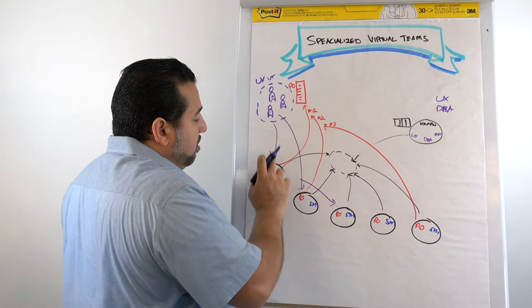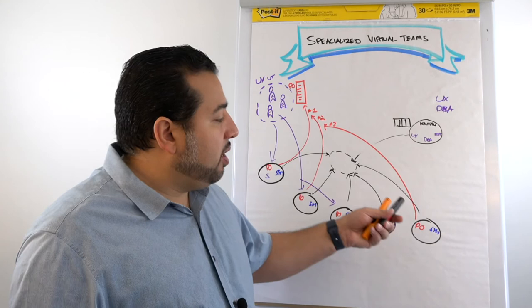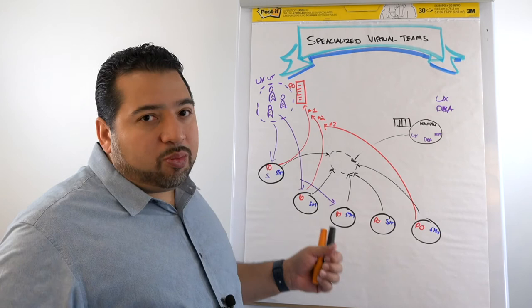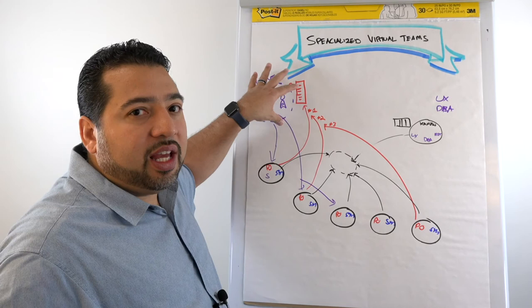And so you're deploying the specialties to those scrum teams as needed on a sprint by sprint basis. That's why it's a virtual team in the sense that they never actually work physically together. They work on, they're always in a scrum team working with a scrum team.